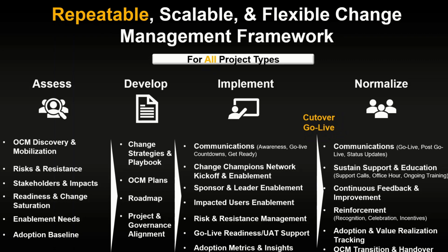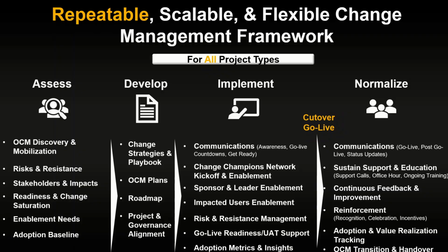And then lastly, we have OCM. Once again, OCM stands for Organizational Change Management. We have OCM transition and handover. This is where the change resource transfers change management ownership to a business as usual team or resource for sustainment.